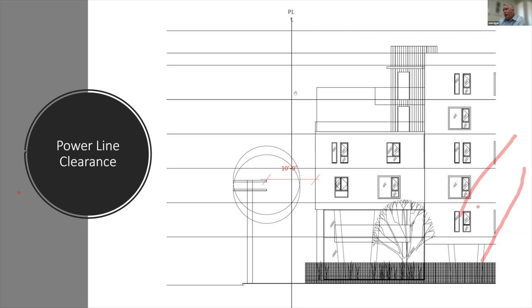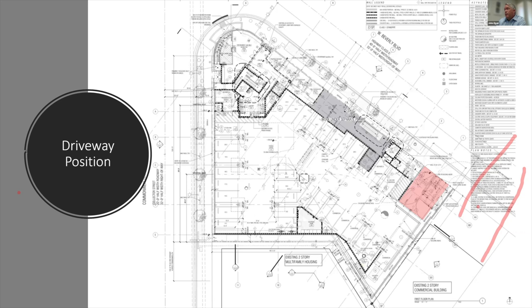And it can impede your site. You can see where I have the property line located on this diagram. And that can actually impact the envelope of your structure. And this is for high voltage lines, which have a tendency to arc electricity. So, you know, they're not going to let you build within a certain distance of that. That's going to be based upon each of your utility providers, whether it's SoCal Edison or Los Angeles DWP or another utility group. They're going to be following the standards associated to clearances and distances, and you need to check on that.